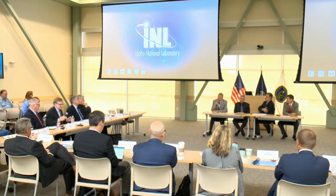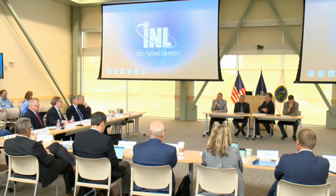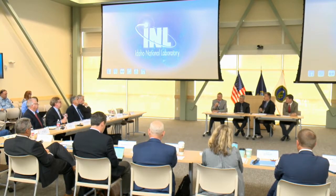John, I'll cover the technical risk side. One of the strategies for this reactor was to minimize the technology risk associated with the reactor by using proven technology in essentially everything. For example, the fuel choice that we have for the reactor has sufficient information that it is licensable right now. So that was one of the primary attributes we were looking for with respect to the fuel, because a single fuel test in the end could take up to 5 years, and we just don't have the time to do new development activities. So fortunately, we have plenty of data for a fuel type that works very well for this reactor. So that's an example.